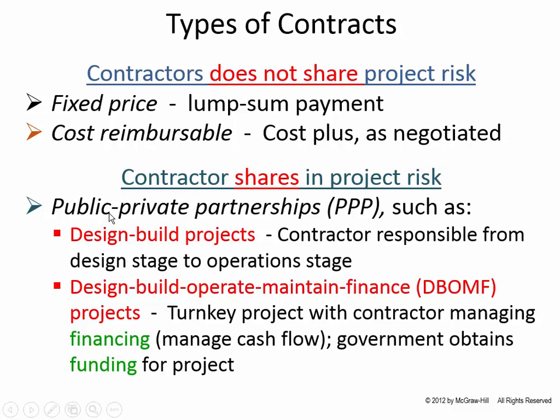One is a design-build project where the contractor is responsible from the beginning of the project, the planning and the design and the construction. And the advantage of doing that is, number one, that the contractor has less conflicts with who designed the project.